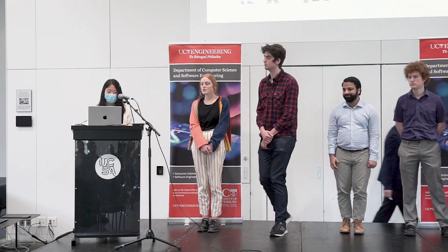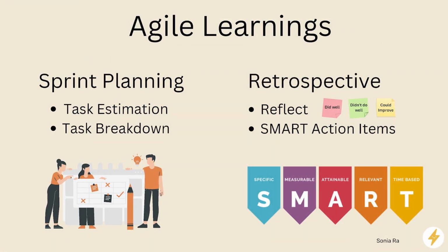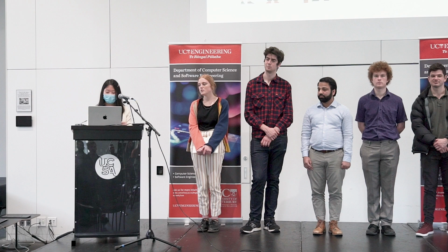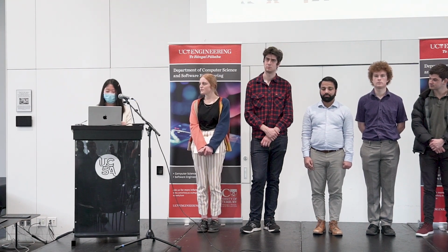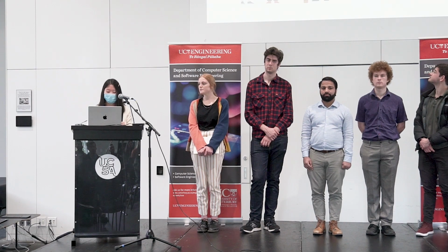This year, we also learned a lot about the agile development process. Sprint planning was a stage where we faced a lot of difficulties. Many of our tasks exceeded the time we had estimated, which was often linked to our task breakdown. We found a lot of our tasks were too large and would often take much longer than estimated to complete, which would cause a lot of blockages.